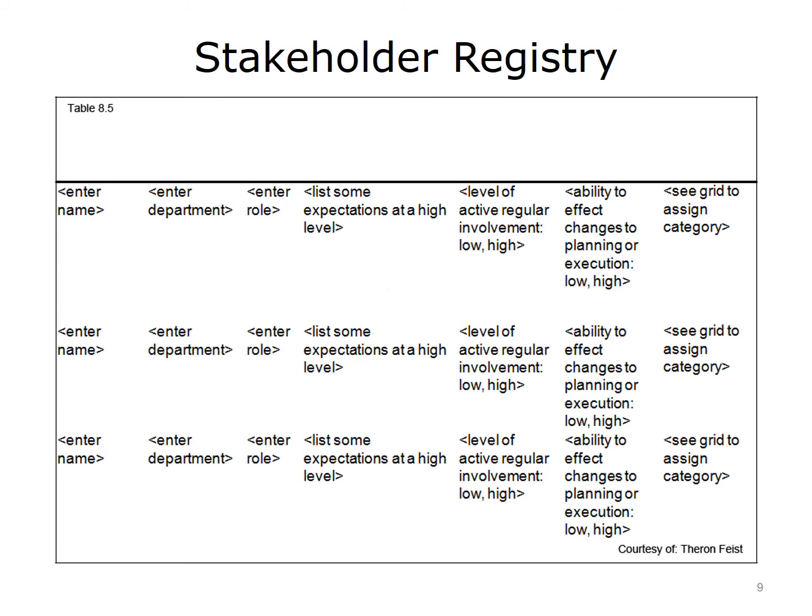The following steps can be used to create your project stakeholder registry. Step 1. Identify all potential stakeholders and relevant information. Add them to the leftmost column on your stakeholder registry. Step 2. Identify and record their department or company, the role they will likely play in your project, what their expectations from the project may be, a description of their type and their level of influence, a measure of their power or impact, and what stakeholder category they fall into.